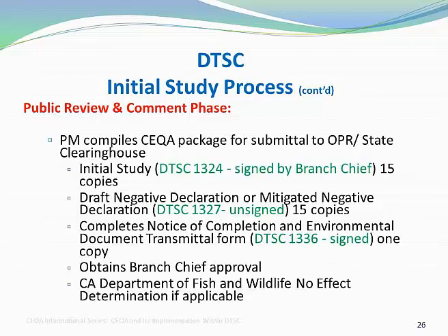The CEQA package includes the initial study signed by the branch chief, the draft negative declaration or mitigated negative declaration unsigned, the notice of completion and environmental document transmittal form, and a copy of the Department of Fish and Wildlife no effect determination. If the Department of Fish and Wildlife agrees there will be no effects on biological resources.